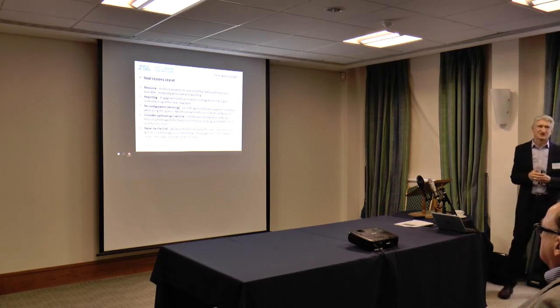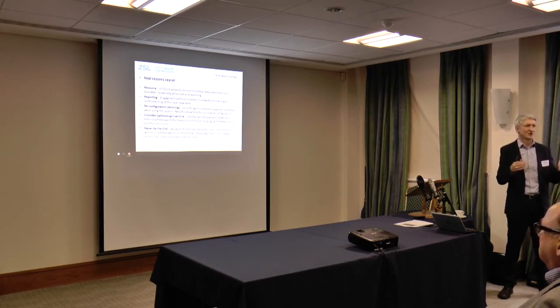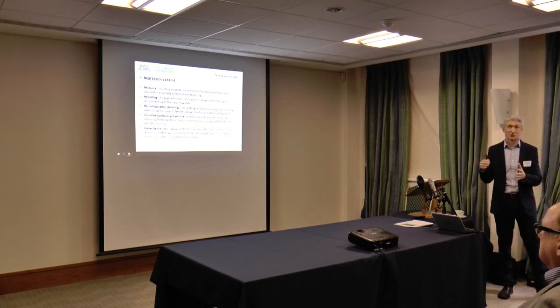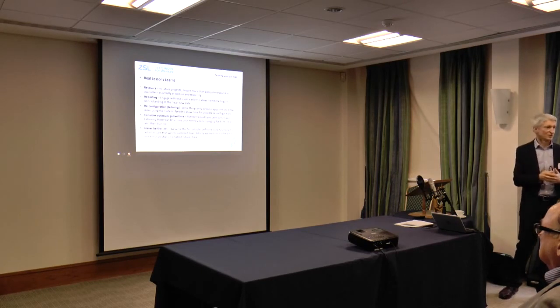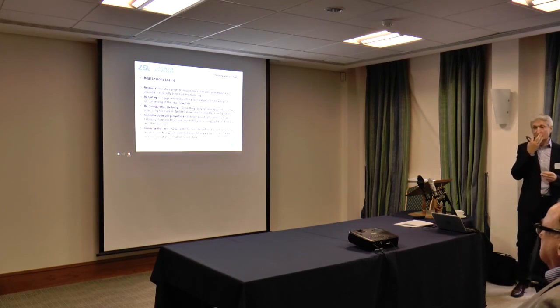Reporting. On every vendor, every project I've ever been on, everyone goes, oh, there's a report writer, you can do whatever reports you want, it'll all be wonderful. But because you don't have the data and you haven't gone live with it, you don't necessarily know what that data will report on. As soon as you go live, everybody wants the report. If you don't know the data well enough to know that the report is exactly what they want, you've then got to have someone who's going to be able to do that. And again, we probably lost a bit of sight of that report writing side.